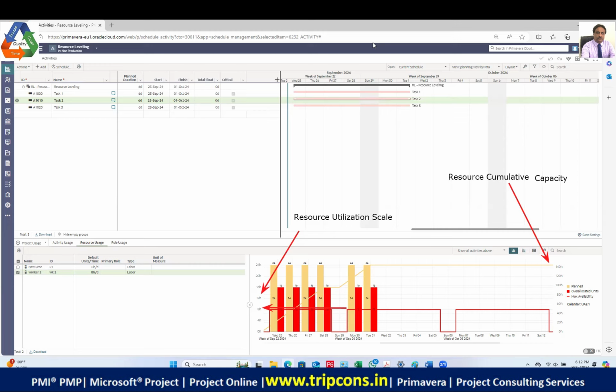Man hours, right? So this shortfall is being displayed in the red color. Did you see the red color? Yes, sir. The shortfall. It says that you need this person for 24 hours. See, I'll just tell you. You need this person for 24 hours and the shortfall is 16 hours.